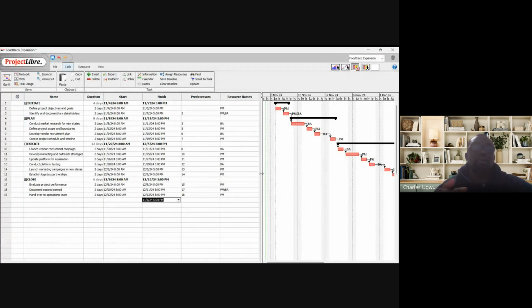Once we baseline it, it means that this project is fully planned and we can use it. So if in future we do any alteration or change anything in this project plan after baselining, it means that it's no longer the original project plan we created initially.